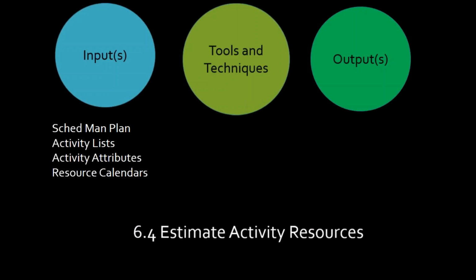This is the first time I'm going to talk to you about a real world impact on a schedule. Here I am defining activities, sequencing activities, defining all the resources, and I'm going to put it together in a schedule. Am I done? No, I'm not done. I have to fit people into that schedule. So guess what? Before I actually make a schedule, I better make sure that my resources are available to me when I'm ready to schedule them, or else I might as well not even do a schedule at all.